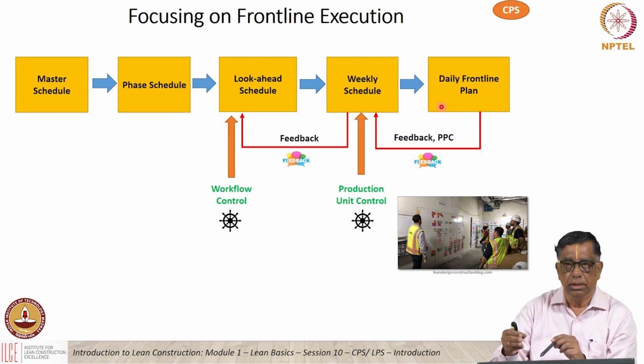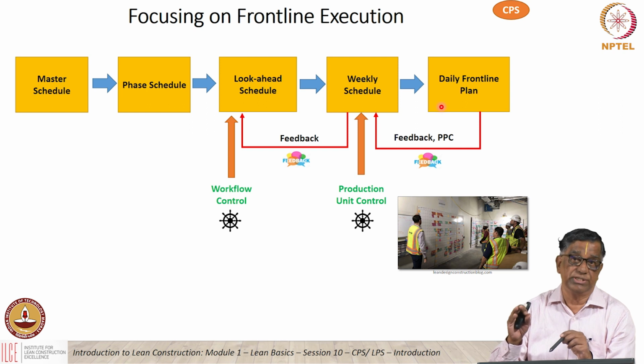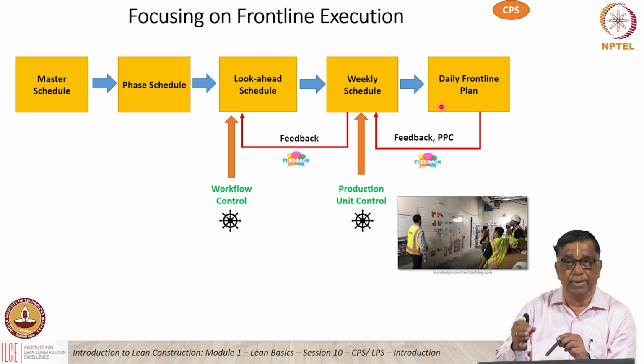If not done, we analyze the reasons. We don't just keep quiet. We want to find out why I could not achieve what I planned for that given day. And then I have what is called a root cause analysis.